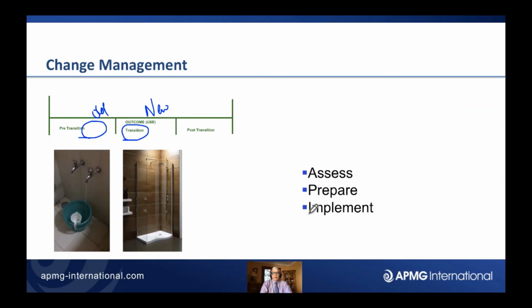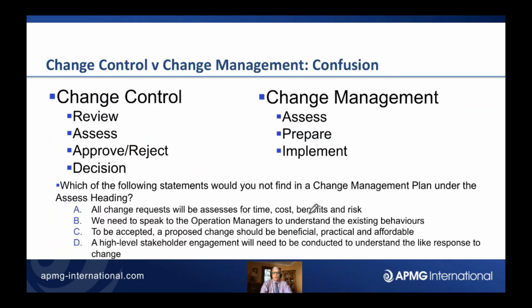So in summary, the change control procedure is dealing with a change of scope, whereas change management is about the people side. It's looking to see: is the department ready to change from the old way of working to the new? We hope this short presentation has given you a better understanding of the difference between change control and change management.